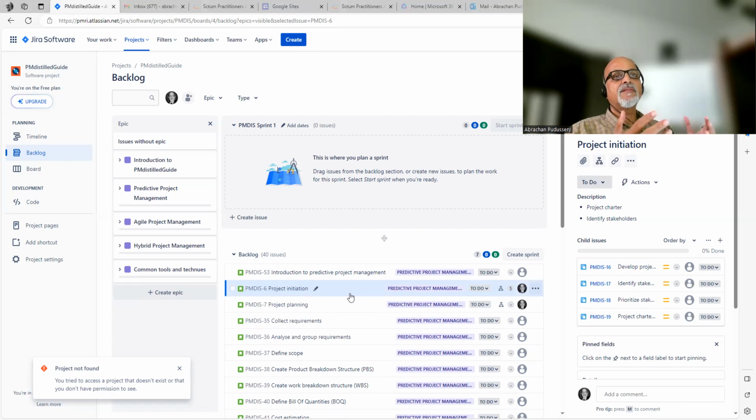We should elaborate it further and further. Sometimes we have to merge some of the stories into one, because there can be a lot of dependencies or cohesion between stories. Then they must be grouped, or they can be merged, and sometimes split into multiple stories. So this is a full-time activity of the product owner. We call it product backlog grooming.